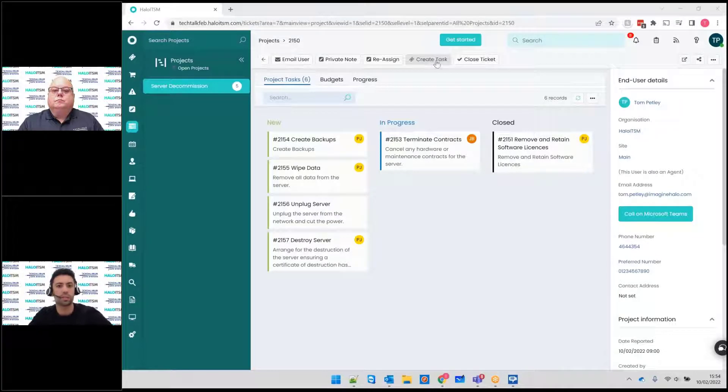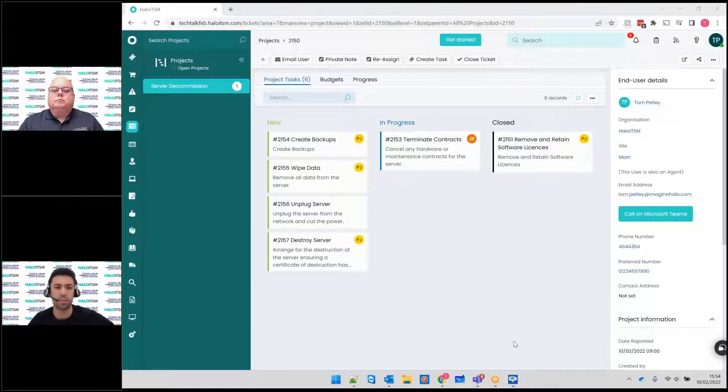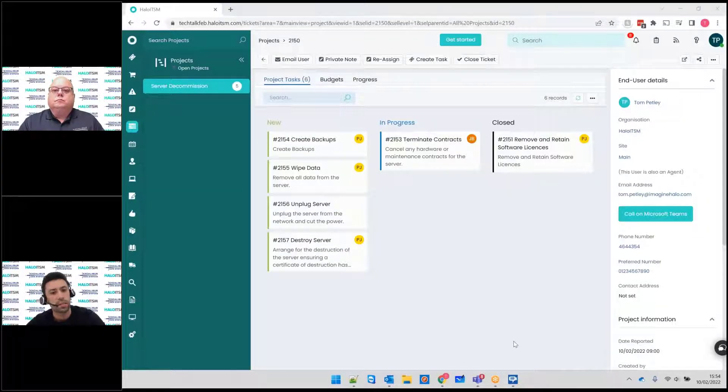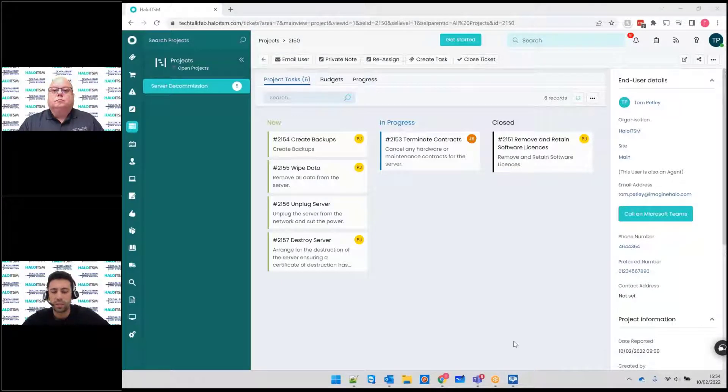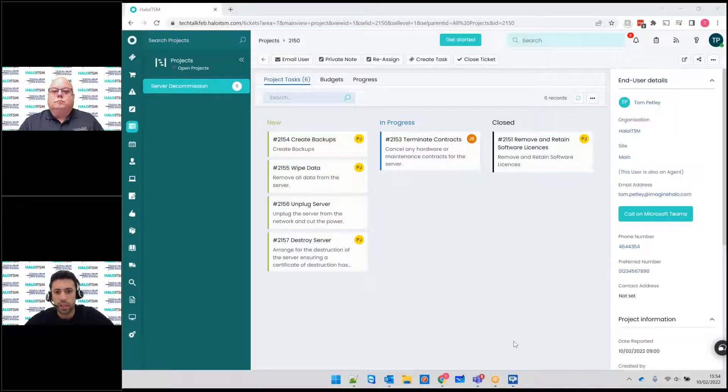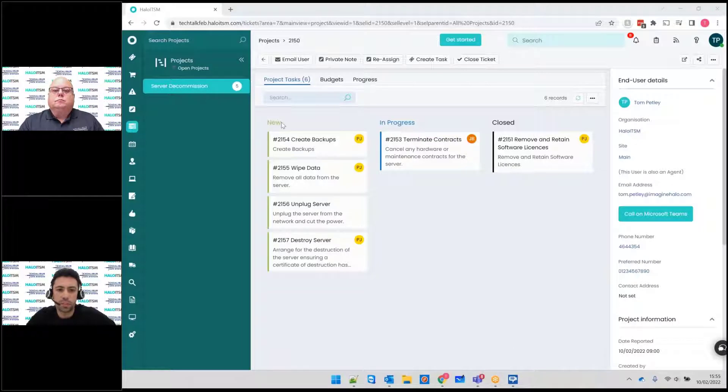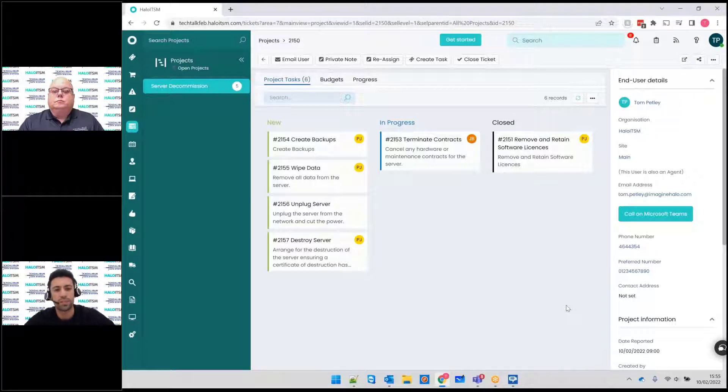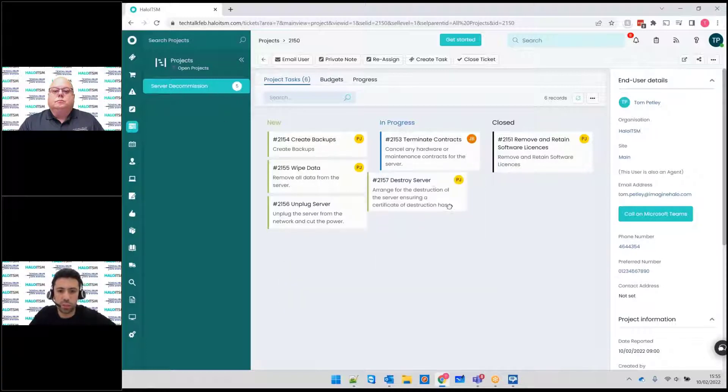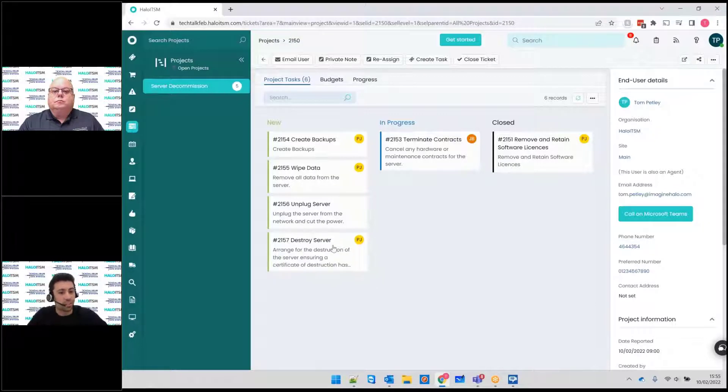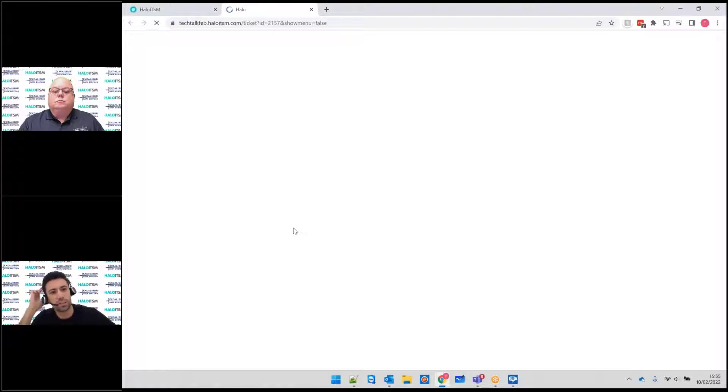And the nice thing is you can basically build out all these tasks. So you can either create tasks kind of ad hoc as you go through it, or if it is something that happens lots of times, maybe a server decommission is quite a good example, you can actually template that. So you can have all those tasks creating when they need to, and they could even be in parallel or in series or however you want to set that up. With each task you'll see here we've got different states that we can track. So kind of new, in progress, closed, very standard Kanban setup, but you can have additional states in there if you want to as well.